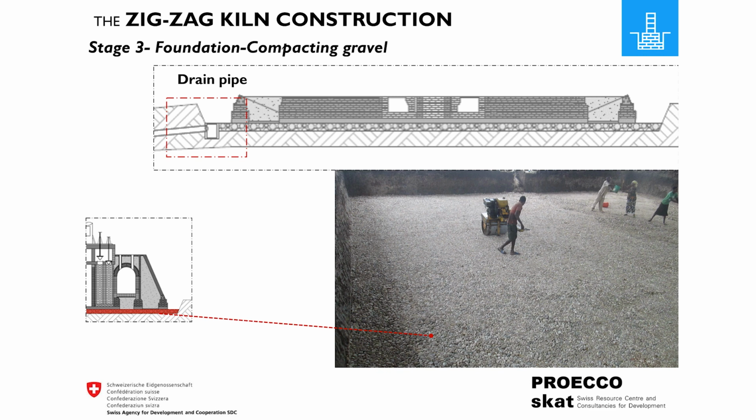Therefore, a proper drainage system is necessary. In a grid-rex region, a 15 to 25 diameter gravel bed is laid to form a thickness of 20 to 40 centimeter foundation drainage substructure. Importantly, gravels are compacted after laying. Then a drain pipe is installed at the kiln base where any water collected is disposed.